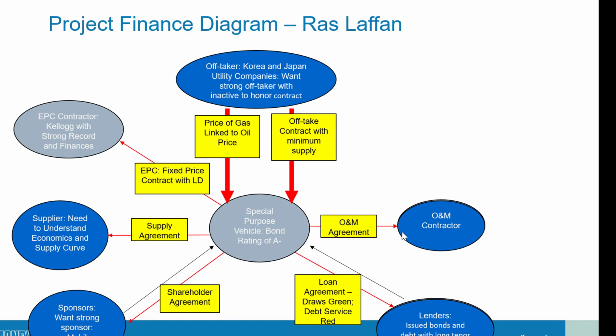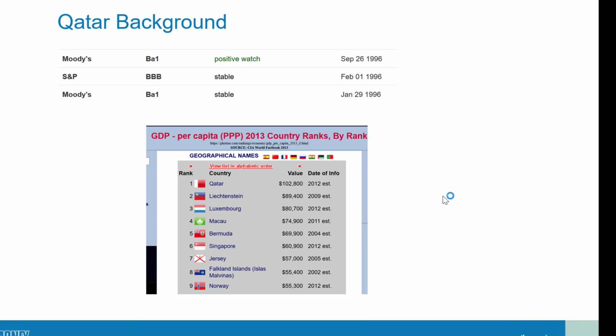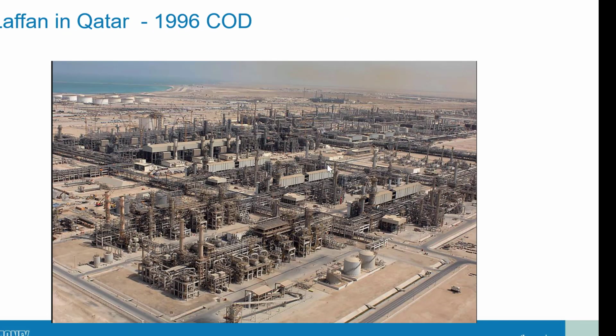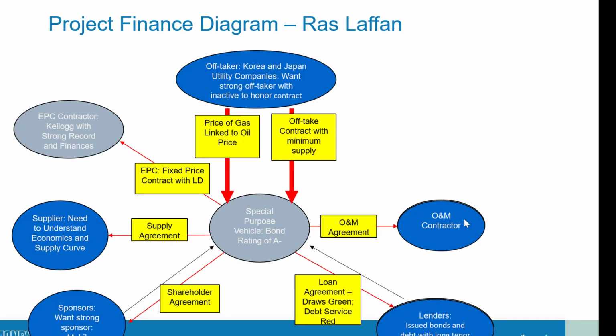And if the O&M contractor screwed up, and some of these things weren't working properly, and the efficiency of all these things wasn't good, you could put penalties and incentives in this O&M contractor, so you can make sure they meet this one. So there should have been almost a line between these two contracts. That's called a back-to-back contract.